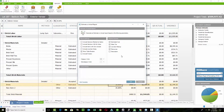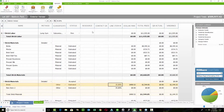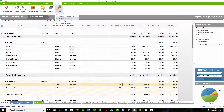The estimate versus actuals report is designed to show discrepancies and pull out the differences. I'm looking for plus or minus 2% as a variance on this one. If I end a half-million dollar job and we're $200 over budget, I think we did okay. Under the report options, you can include areas marked as options, sections with no value where there could be actual costs for unforeseen expenses, and areas with zero actual costs for items we've estimated but haven't started spending on yet. Plug those in, generate the report, and it gives you a nice table.